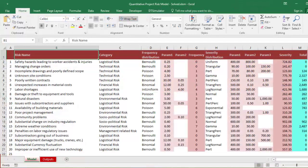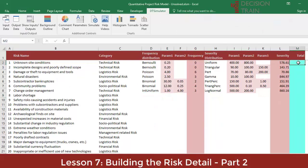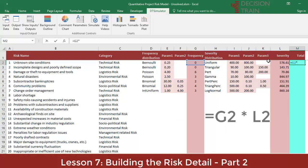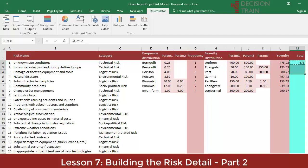Do not worry about the content of columns G for frequency and L for severity, which will contain values other than yours, as they are the columns that precisely generate the random numbers based on the inserted probability distributions. Column M is simply the multiplication of frequency times severity. In cell M2, type the following function: equals G2 times L2. Then copy this formula down for the remaining 19 output variables of risks.